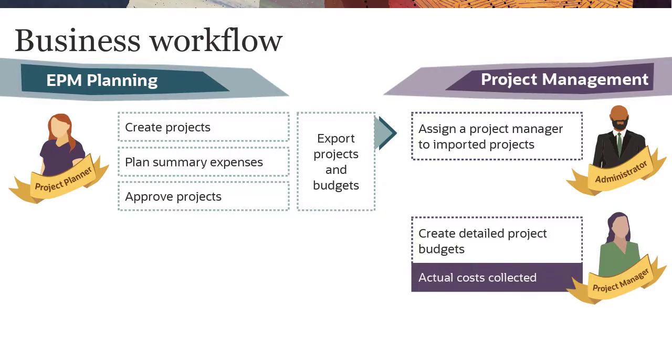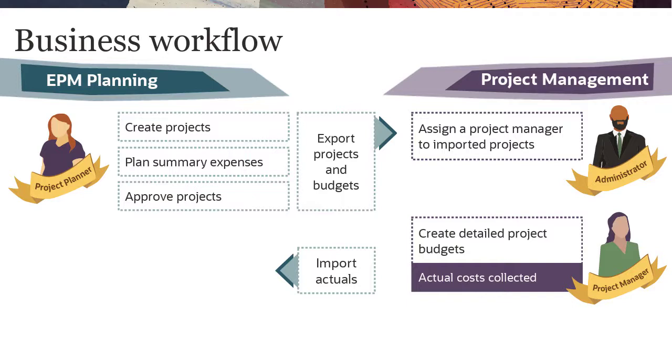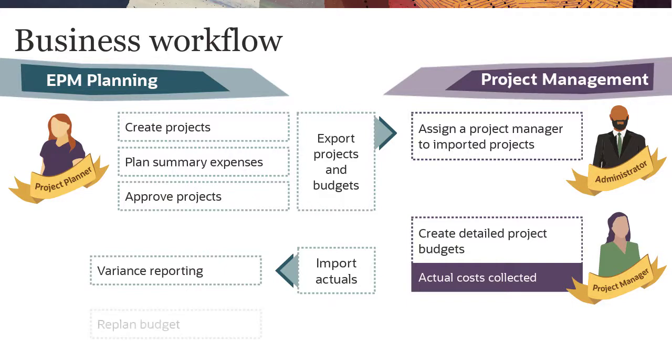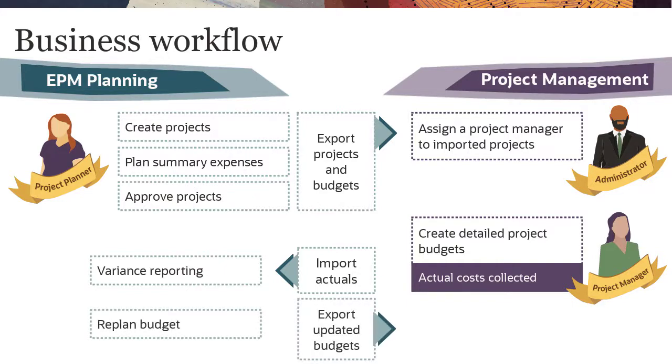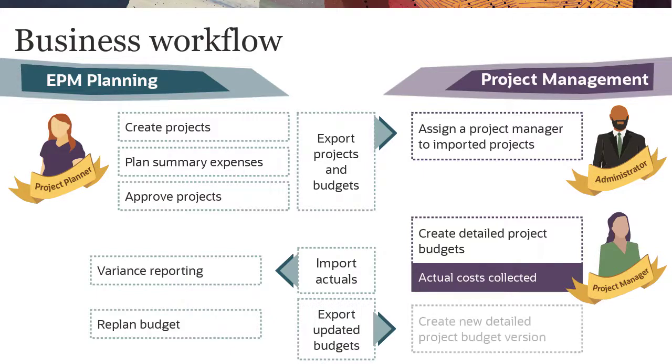Actual data is collected in Project Management as the project proceeds. At regular intervals, the EPM Project Planner or a Planning Administrator imports project actuals to EPM Planning, where they perform variance analysis between actual and planned data. They can then re-plan the budget and export updates to Project Management, where the Project Manager creates a new version of the detailed budget.